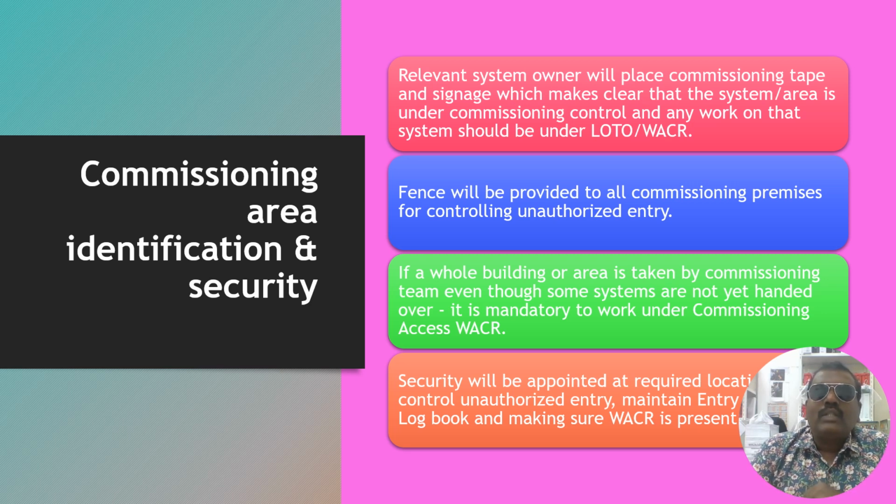Okay, so a security person will be appointed at the required location. He will be controlling unauthorized entry, maintaining the entry logbook, and making sure that the WACR is available. This is his responsibility.